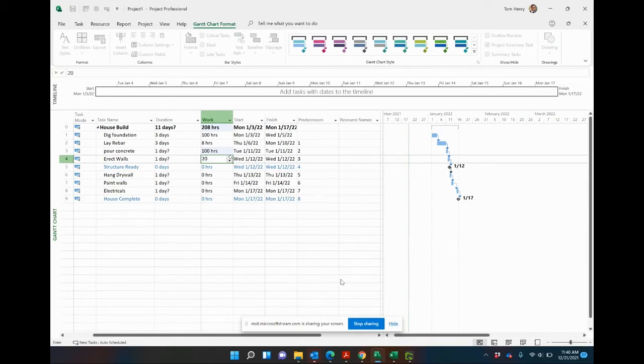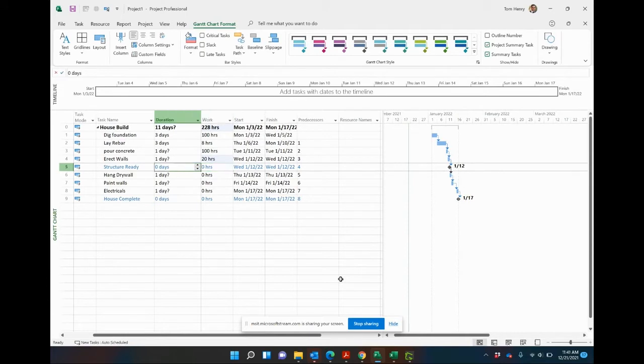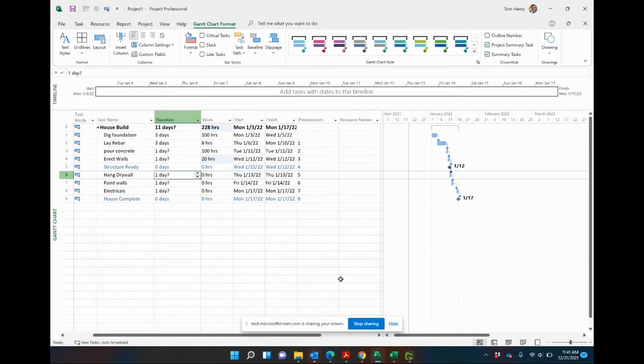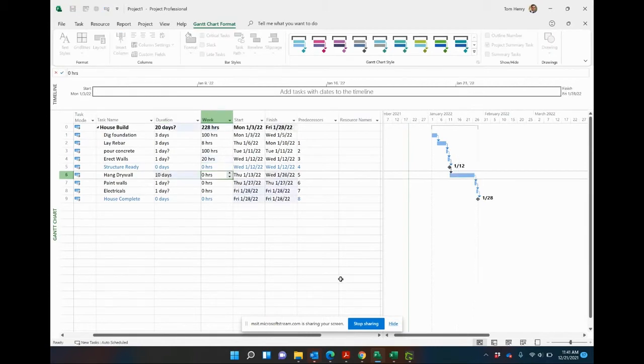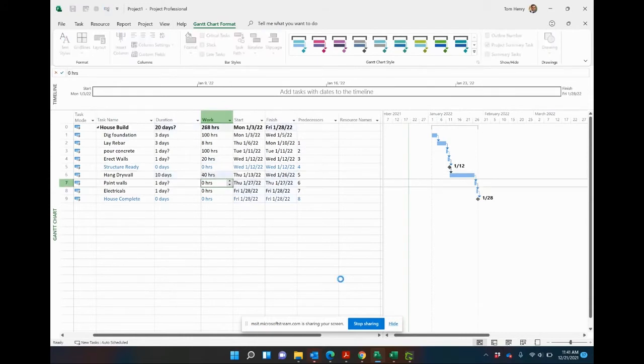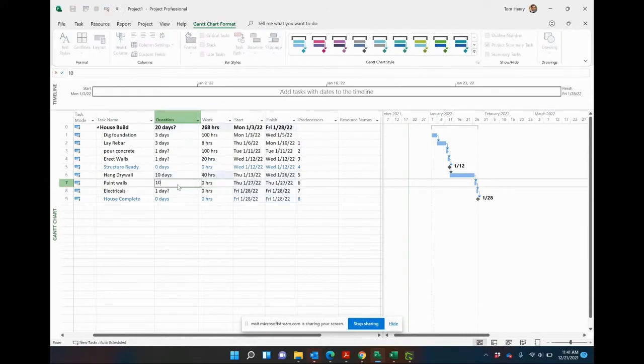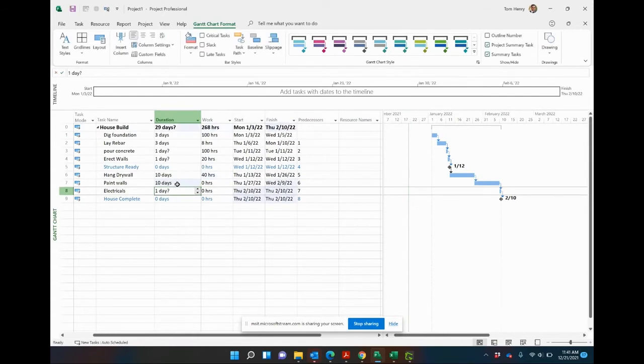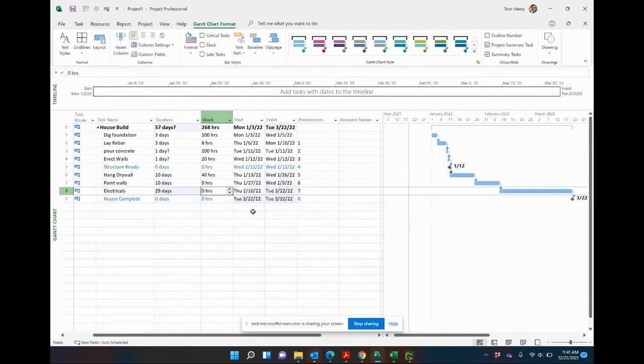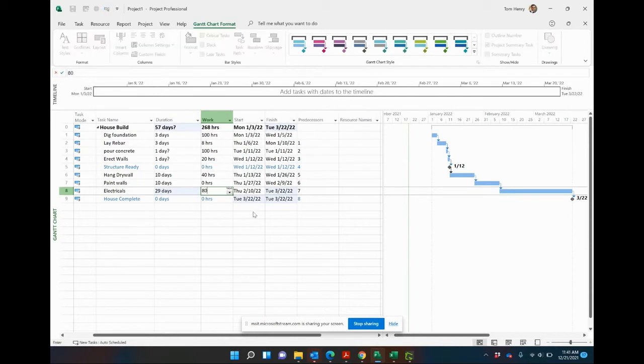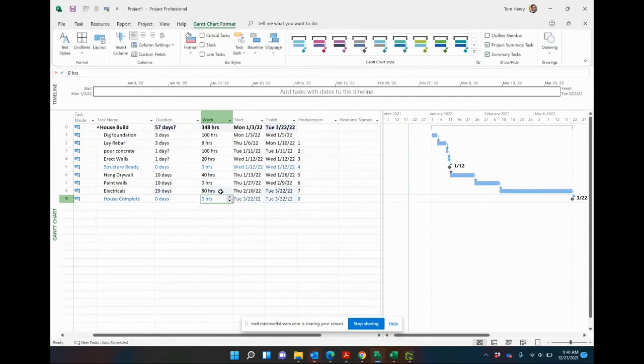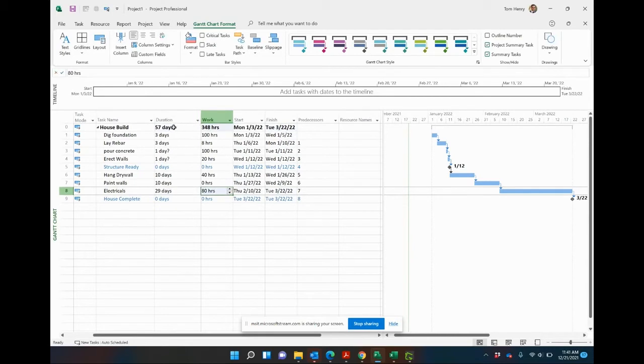This is a milestone, zero day duration, zero hours of work. And the drywall, let's say that's going to take 10 days and it's going to take 40 hours. Boom. So as you can see, we can quickly come in. I'm just going to add these in here. Electrical, so it's 29 days, maybe they're just coming in off and on and waiting for other people to do their work in between, but it's only roughly 80 hours, so I'm working part-time on that generally. So there we go, we've got the duration and the work of it estimated.